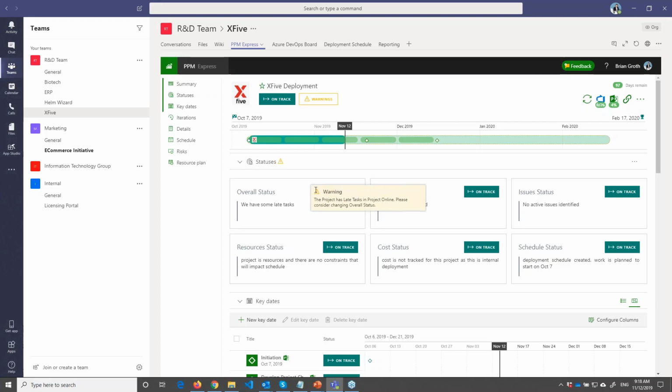Please consider changing the overall status. So I'm not looking into just the key dates. We're saying that okay, the project manager says that the overall status is on track, but there are late tasks. It's not true. You need to update it. It's outdated. And the reason why we do that is that the earlier project managers, executives, and project sponsors see this information, the more time they have to proactively address the problem and take proactive actions with the project.